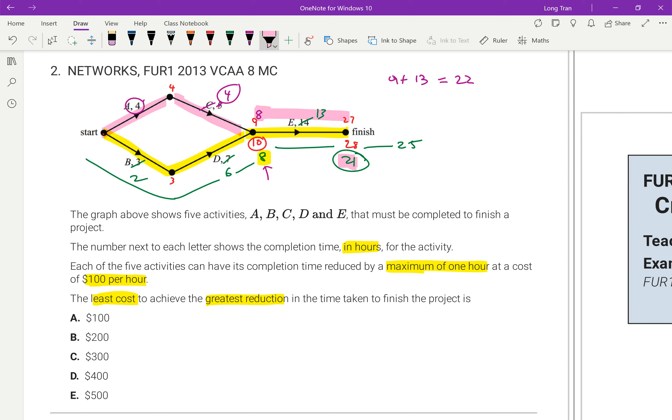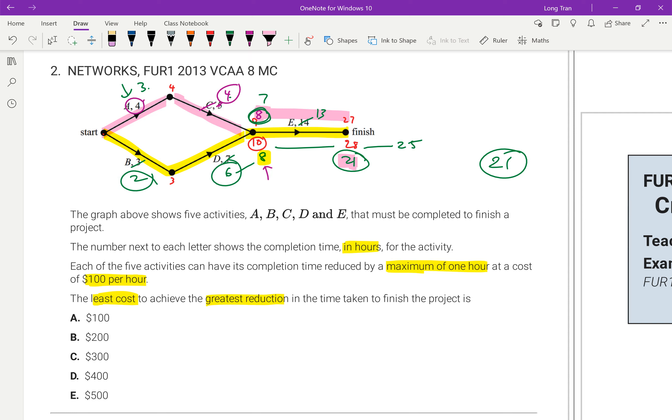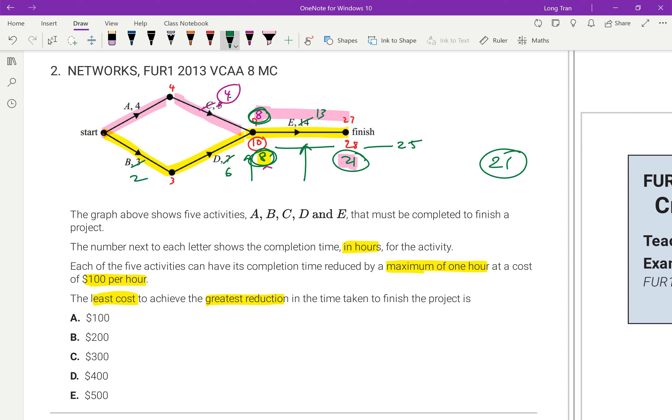So therefore, what's the smallest value I can reduce down to? It has to be 21. You see, there's no point reducing A because even if I reduce A down to three, three plus the four is seven, eight still takes precedence because two plus the six gives me eight. So unless I can reduce this any further, which I can't because remember there was a cap of one hour per activity. So there was no point taking A away. So the best I can do is get to this point at eight. That was the best thing. And then I can reduce the E by an extra one. And so 21 is the best that I can do.